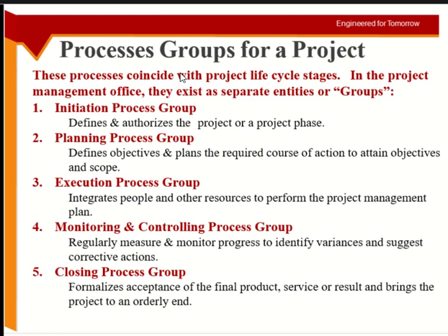Then you have monitoring and controlling, which happens alongside. I told you, this is like an overlap. You do not wait till the end of the project to monitor it. You have to monitor the whole process. You regularly measure and monitor any variations from your plan in terms of budget, time, quality, specifications and so on. Any corrective actions to be taken, you do as soon as possible. Then we have the closure, which is the acceptance of the final product, and you bring the project to an end.